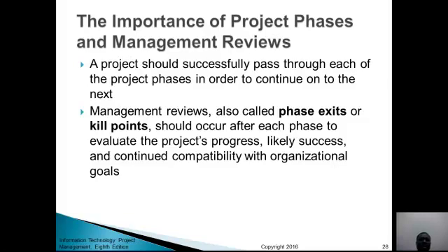So the importance of these project phases. A project should successfully pass through each of the project phases in order to continue on to the next. So management reviews, also called the phase exits. See, at every phase or stage within these cycles, management must meet and know, are we successful? Are the deliverables really what we want? Okay, if you don't review and you complete the entire project and then you realize that you made a mistake along the line, then the whole project becomes useless.